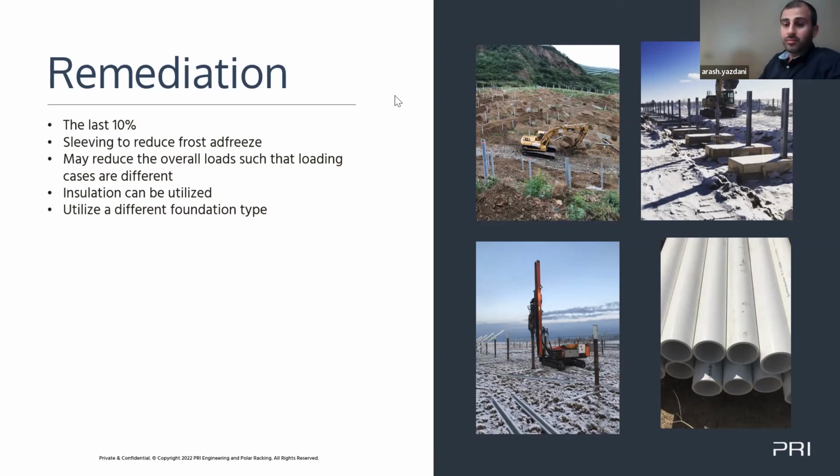And that's why I treat every pile like a data point. Like you mentioned, like manufacturing, like auto manufacturing, we have a total quality management with upper control limits and lower control limits. We're trying to narrow that right down to the middle so that we have the least amount of waste. So I treat it as a manufacturing line with a total quality management, Six Sigma type of approach to it, which is really hard to find in drilling. Most drillers just stick a pile in the ground, no problem. But you take a different approach to it for sure.